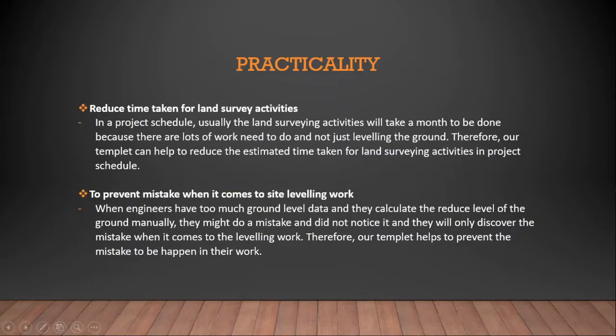Okay, next, for the practicality, the first point is reduce time taken for land survey activities. In a project schedule, usually land surveying activities will take a month because it is not just leveling the ground. There are lots of work that need to be done also. Therefore, our template can help to reduce the estimated time taken that has been calculated for the land surveying activities in a project schedule. Maybe it can be reduced to 3 weeks.